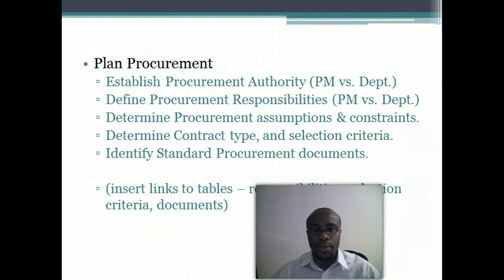One of the assumptions that we used was that no make or buy analysis was required for this plan because we didn't see any feasible means of making any of the product components that we'll be utilizing for this project. In addition to that, we also assumed that no insurance or bonding requirements were necessary, just due to the scope and nature of this project.